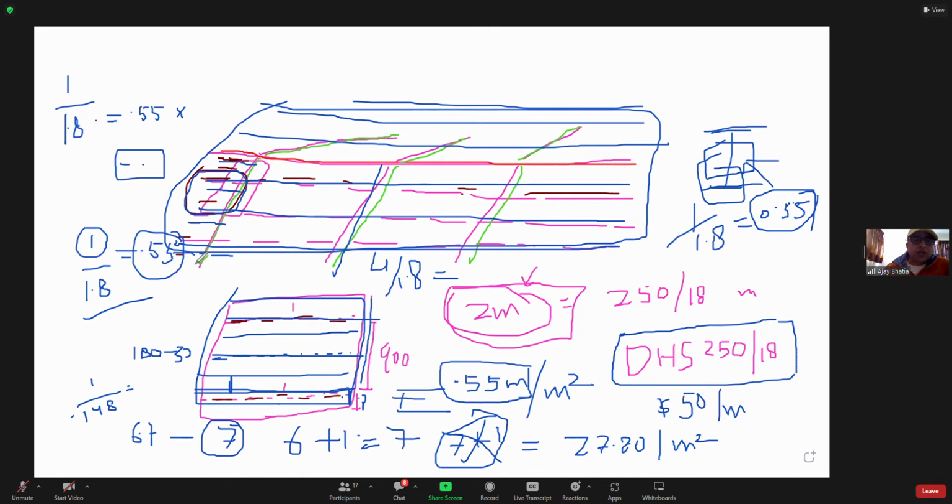In this case, you do not have any leftover portion, because there's 1 purlin going, there's no half purlin or anything coming in 1 meter over there. So you just go by this thing. You do not add anything on that. That is the difference between weatherboard and purlins over there.